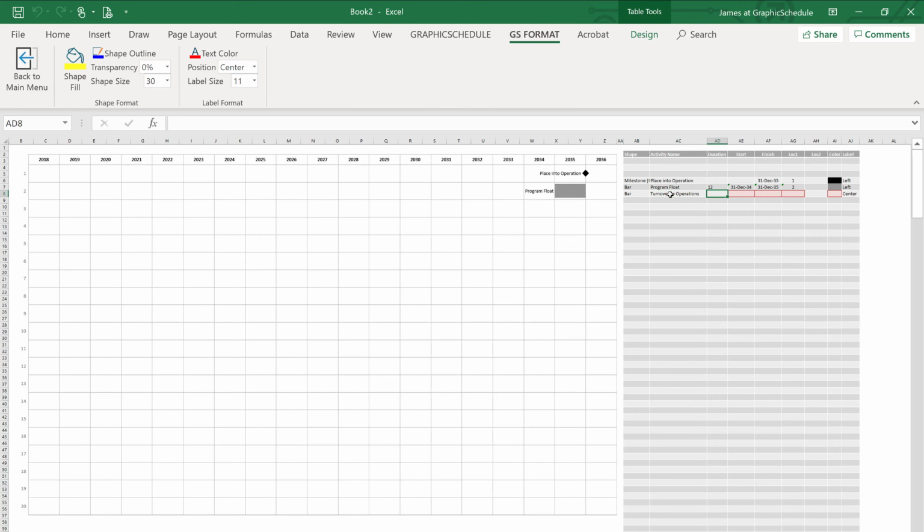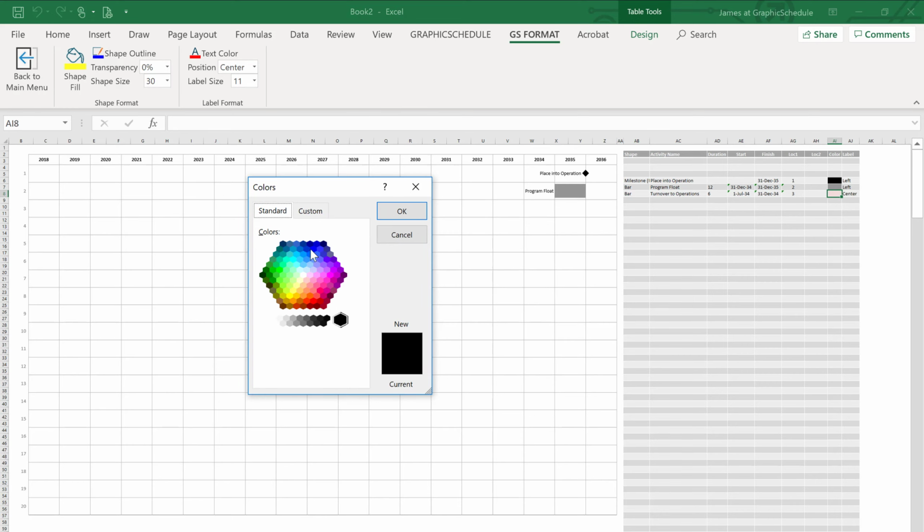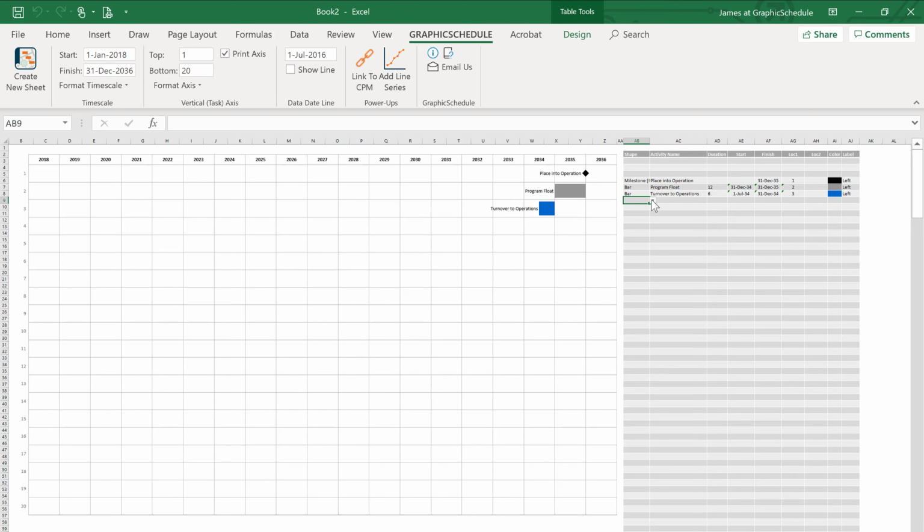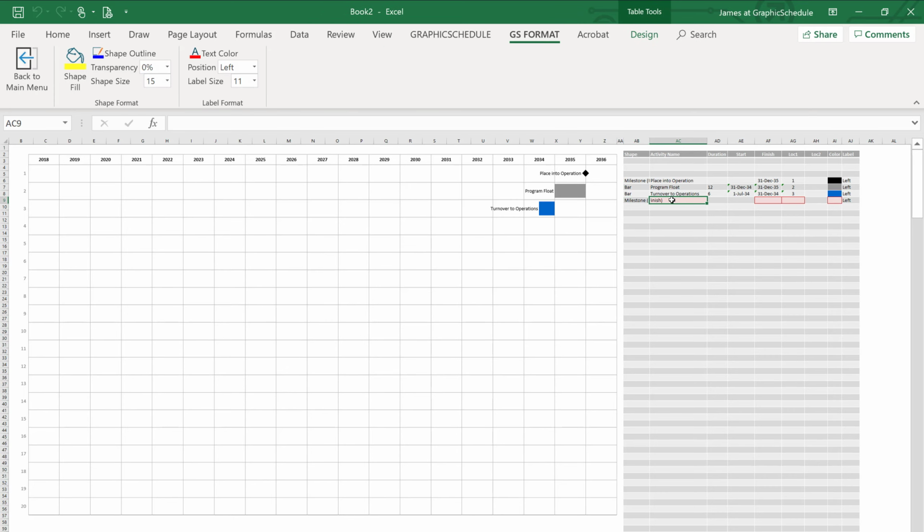You might assume that construction is the last activity before operations, but on many projects, there's a period where the owner takes control of the facility, moves in their equipment, and trains the operations and maintenance crews. This takes time, and we need to account for it in our plan. Prior to turnover, the contractor must achieve substantial completion, so we'll set that finish milestone equal to the start of the turnover activity. This example assumes design build delivery, but you can use this method on design bid build projects too.